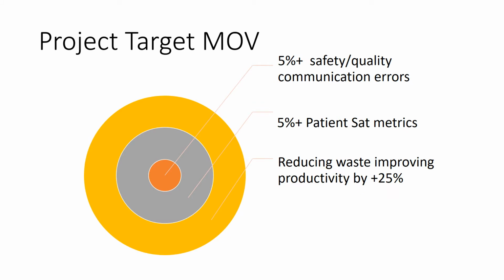The project's overall goal and measure of value and measures of success is that the technology will enhance patient-provider communication, which will be measured by reducing safety and quality communication errors by 5% from implementation date, benchmarked to 6 months before.